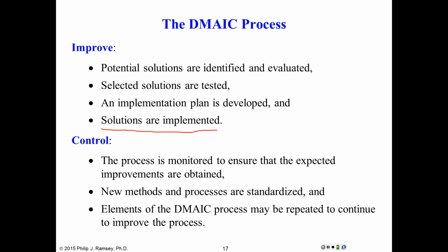Well, historically, at this point, a team would implement a solution, hold a self-congratulatory party, and go off their separate ways. And the solutions they implemented often have completely been undone, even within hours, maybe weeks. So they recognized this in the Six Sigma development, and they added what was called the control phase. So we implement improvements, but the team doesn't disband.